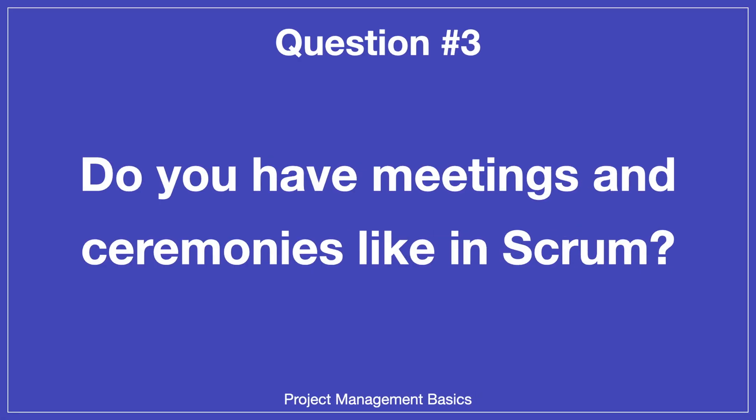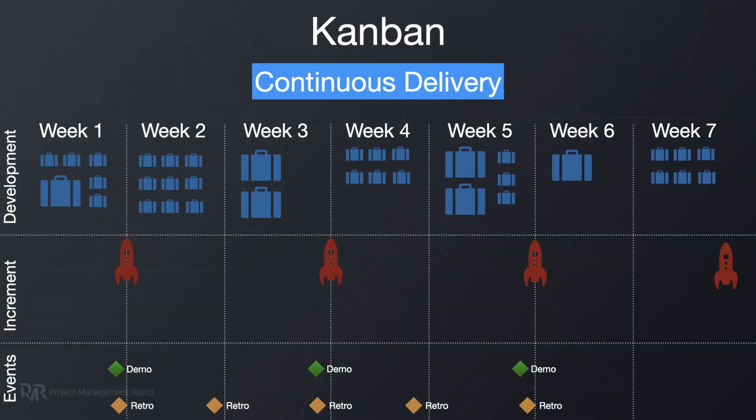Do you have meetings and ceremonies like in Scrum? The Kanban approach does not prescribe meetings and ceremonies, but it implies you can introduce some routines. Kanban is a continuous process — it never stops. However, in the real world it's very hard to deliver each separate task directly to end users. Instead, you set up a cadence to deliver results to customers. For example, you can have a demo every two weeks and release a new product version afterwards, with retrospective meetings and backlog groomings every week. This cadence is a super-structure of your main Kanban workflow.